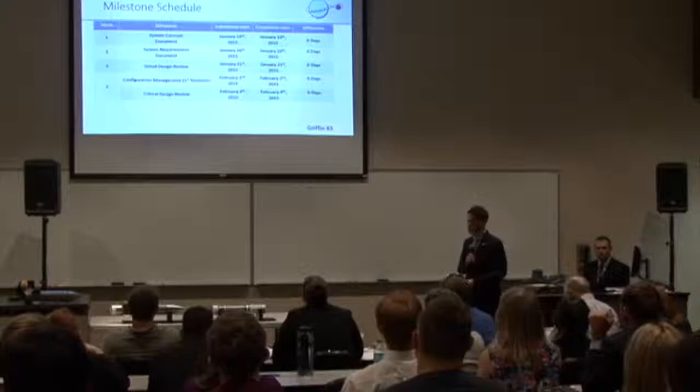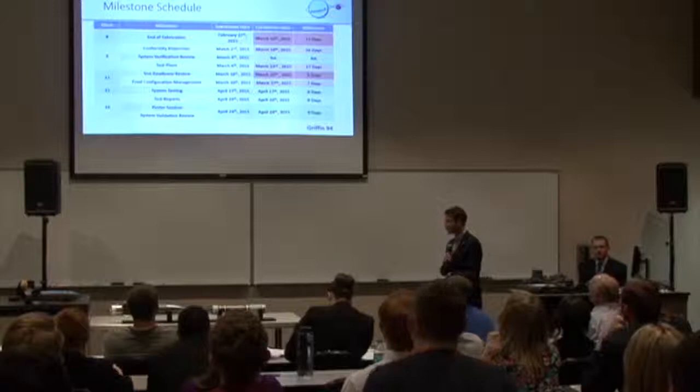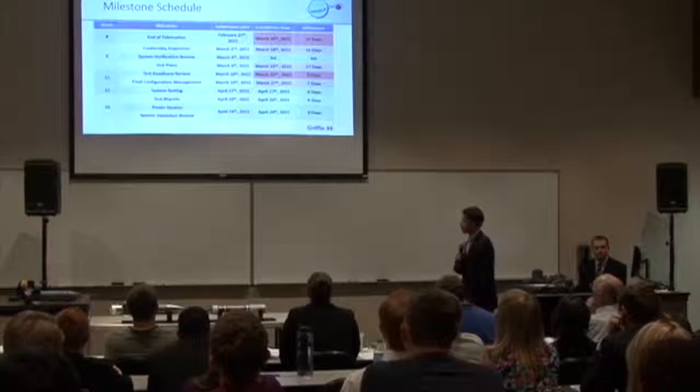Moving on from there, we hit problems. We started out 17 days behind schedule when we finally finished our fabrication. From there, we incrementally improved, and our last delayed milestone was our final configuration management, and that was about a week late. After that, we finished our system testing on time, and from then on, we have been on course.